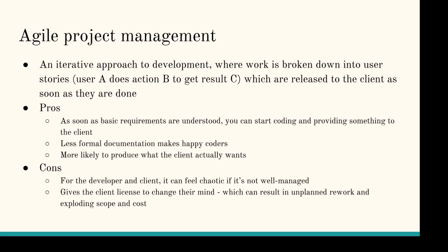Okay? So we have to have things in place like stand-up meetings. A stand-up meeting is a meeting that takes place every day. In some teams, it may take place more than once a day when the schedule's really short. Like if it's a 2-day sprint schedule, you might meet twice a day. You might have a stand-up twice a day. And in a stand-up meeting, everyone who's working on that team, and it's usually less than 10 people, okay?